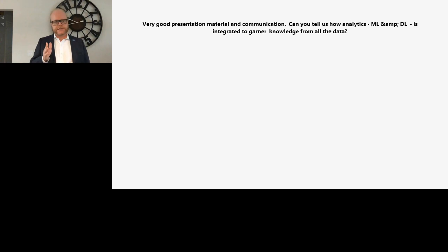But you can also see if it was installed correctly. This is the big piece on progress monitoring. Because if you have put something in and it's off by maybe a degree or two, our analytics will capture it and say that that's actually installed and out of tolerance. You can't count it as progressing. It needs to be replaced or re-engineered. And that's where we can catch and deliver valuable analytics the very next day, because you may not find out about that challenge for another 3 weeks or a month, and then it's too late and you've got to pull back a project and start to take things down again. So those analytics exist. That's key information, and that's what platforms like VEERUM's do today.